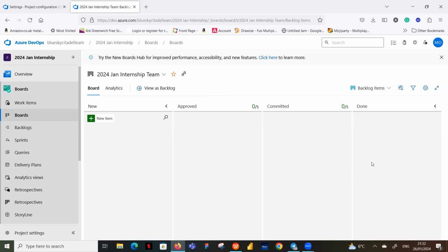And again, I will refer back to the inherited process. This is why you need an inherited process. If we had stayed on Scrum, there might be another team for whom this is okay, they don't need all the extras, and another team might want all the extras. If we stay on the Scrum process and we add all the extras, every project under that Scrum will have all the extras. So that's why we have that inherited process, so that whatever configuration we do stays on our own project board. It doesn't escalate to other project boards.